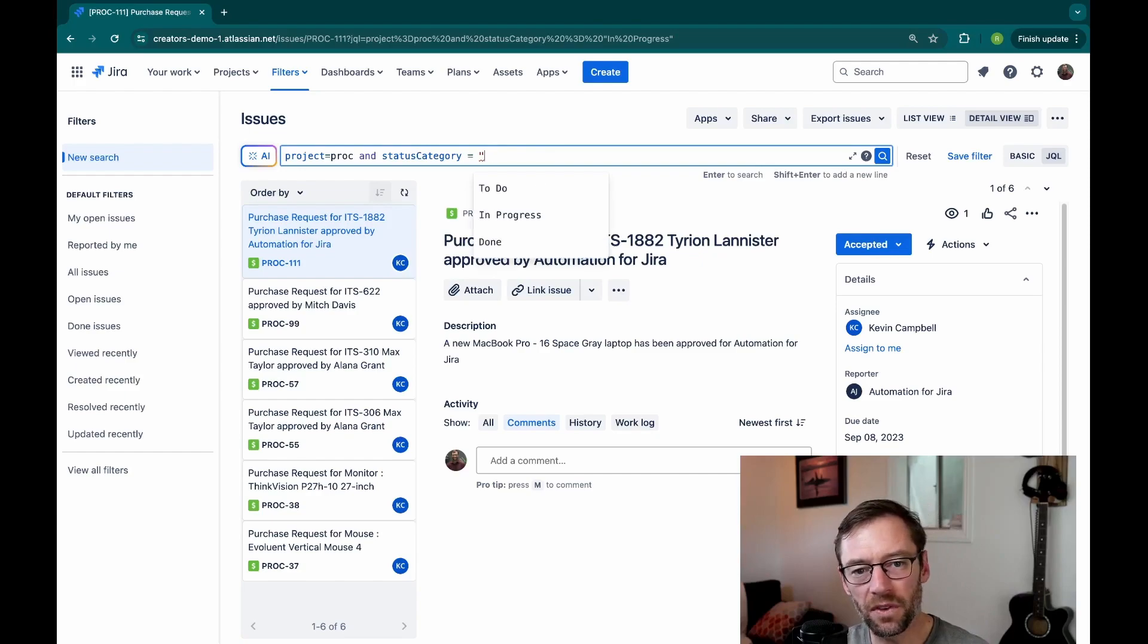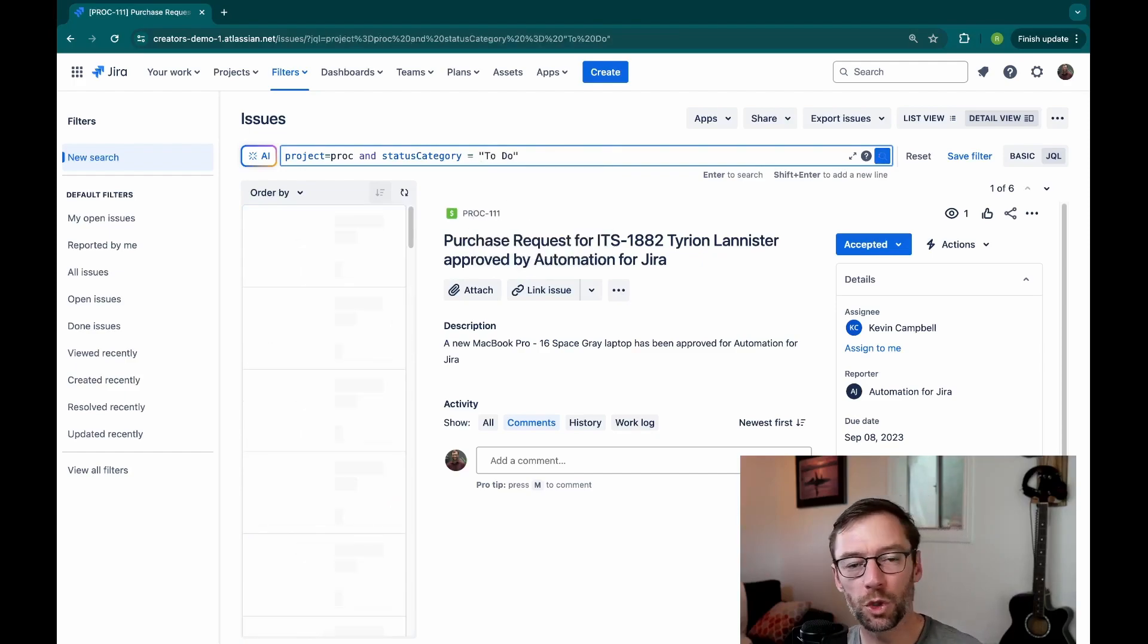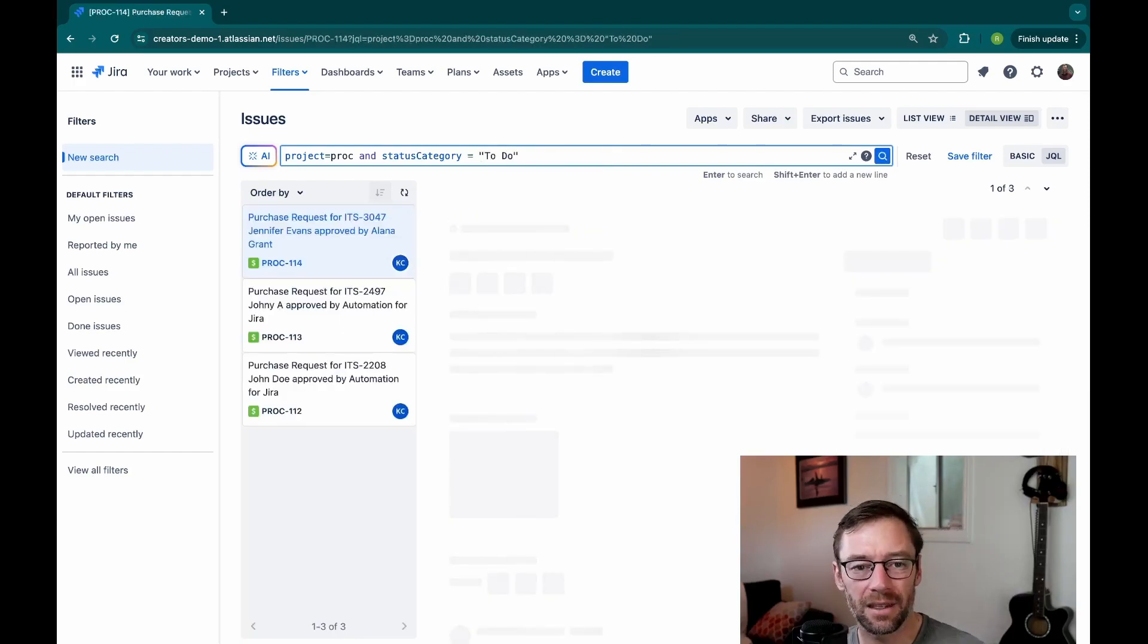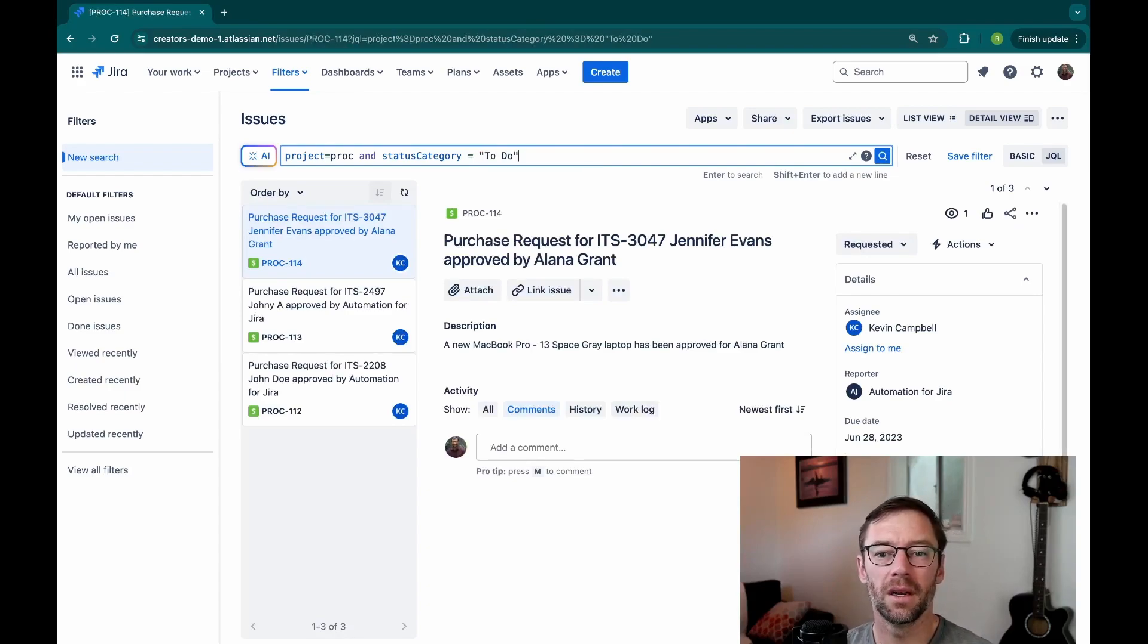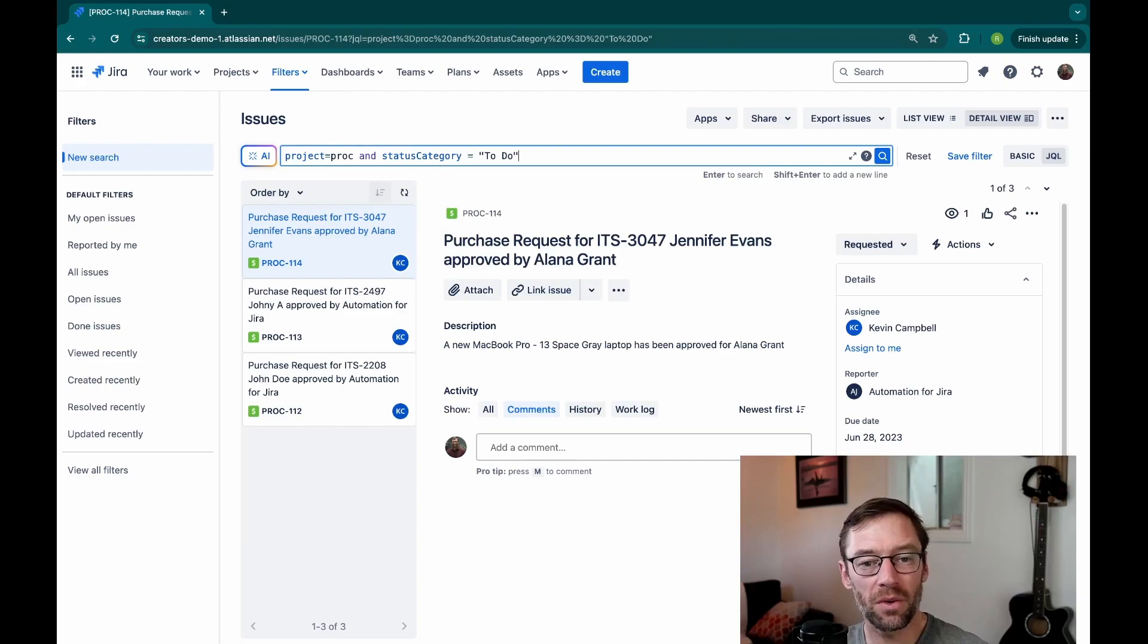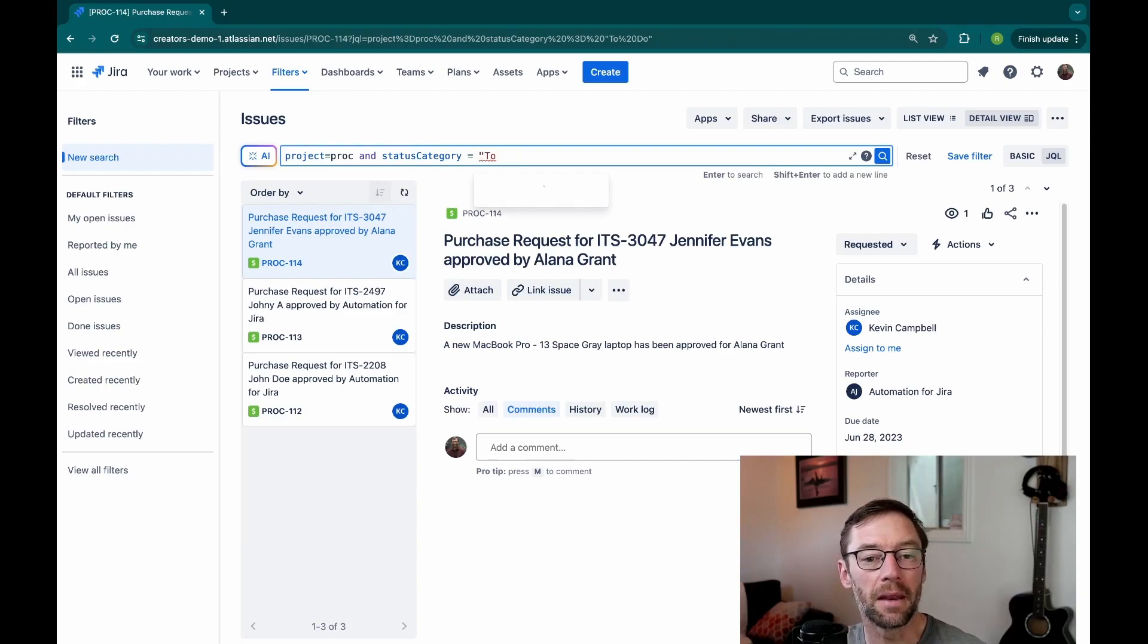Another one that's very useful is to-do. And this one shows me any ticket that hasn't been actioned yet or is at the start of its workflow. So status category is a great way to figure out what group of statuses something is in.